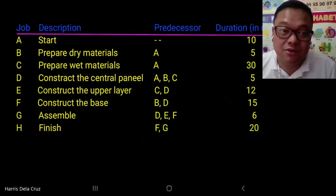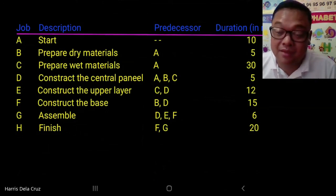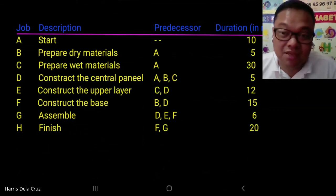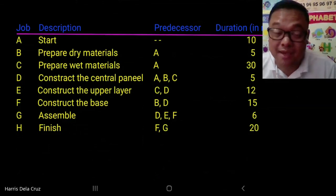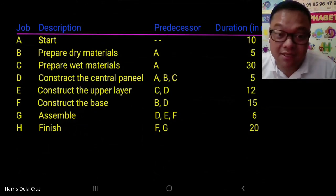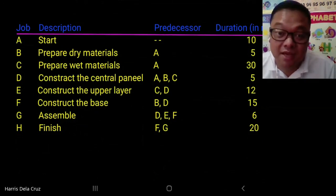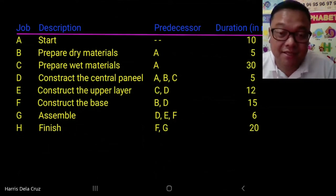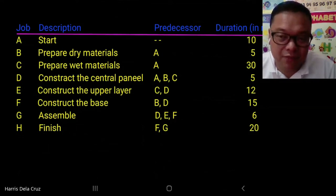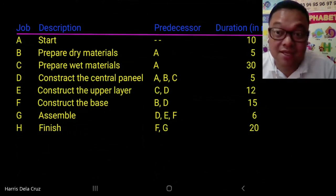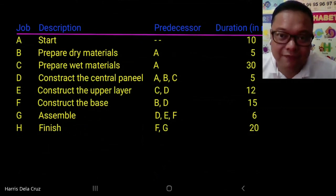Job A is not dependent since it is the start. Jobs B and C are both dependent on A. Job D is dependent on jobs A, B, and C. Job E is dependent on C and D. Job F is dependent on B and D. Job G is dependent on D, E, and F. Job H is dependent on F and G.